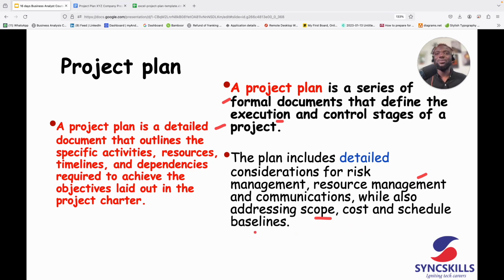So it's important because if your scope expands significantly, through scope creep, there's an impact on the cost, on the schedule, quality, resourcing, and other parts of your project, which would mean that you'll not be able to deliver the project on time, on budget, on resourcing. So it's important for you to have a plan in your project plan on how you manage all of these different factors.